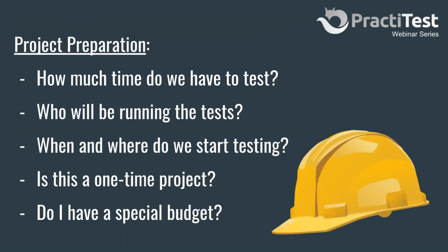And this might seem like a trivial question. Oh, well, testers are going to be running them. Well, not always. I've been in a couple of projects where you had multiple players running tests. So we had a first phase where the people running the test cases were people in-house, obviously testers, but then we had a user acceptance test that ran throughout the whole world. We had to make sure that people from all over the world, who are not testers, maybe business owners, were running those test cases. And so we had to prepare for that.